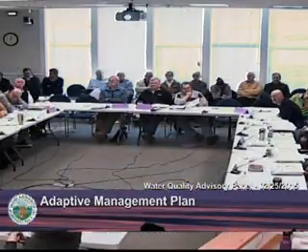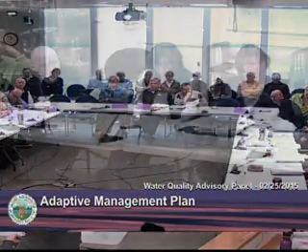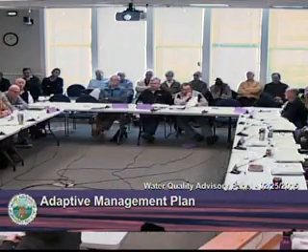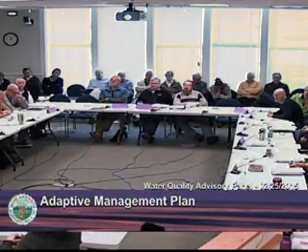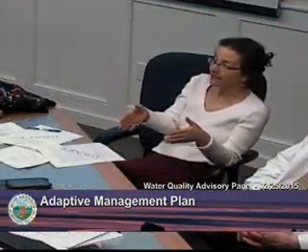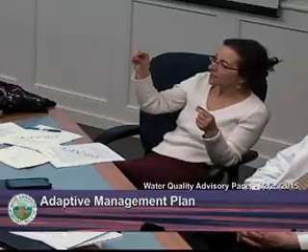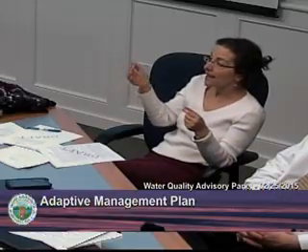And the other thing, Carol, I would say about trying to agree with the agreement right now is we don't really know the extent to which the non-traditionals will work. They may work at a smaller amount than expected, and they may work to a greater extent. So trying to define what specifically to do would almost be impossible. But the reason I thought the adaptive management plan made sense is there are trigger and decision points after 3 years of evaluating, monitoring PRVs, for example, from floating wetlands.